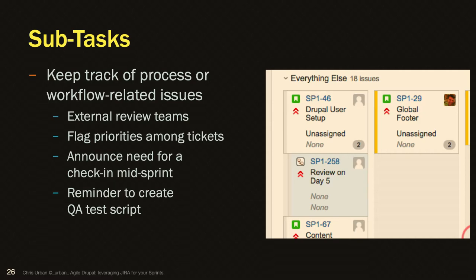Create a subtask for them, because then you can point fingers and say, hey, design team, this is supposed to be reviewed on day five, and where are you? You're holding everything up, you're a blocker, you're gonna run our budget over. See where I'm going with this? You wanna be able to trace where the assignments are going or what the dependencies are outside of the system. If you use subtasks for this, it makes it extremely clear and explicit without impacting the sanctity of the original ticket.